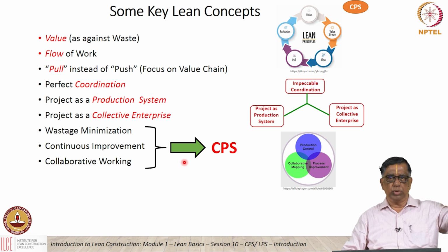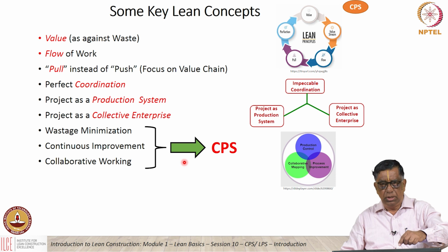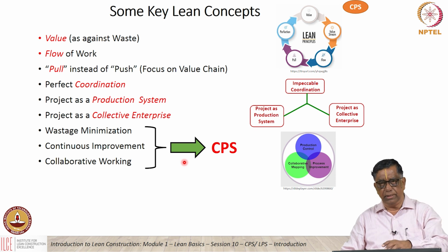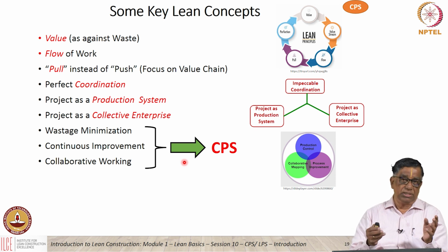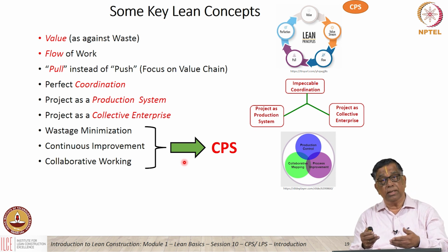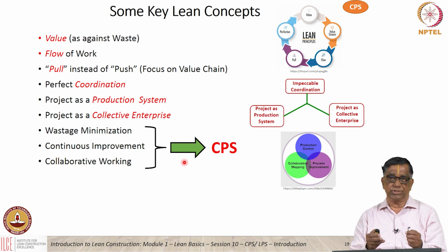A feedback goes to him, then again talks to somebody else. So, all your communications are vertical, from the concerned department to the planning manager, and then again in return. So, the planning manager is overburdened with the coordination work, and there is no communication across the levels where the actual work is taking place.